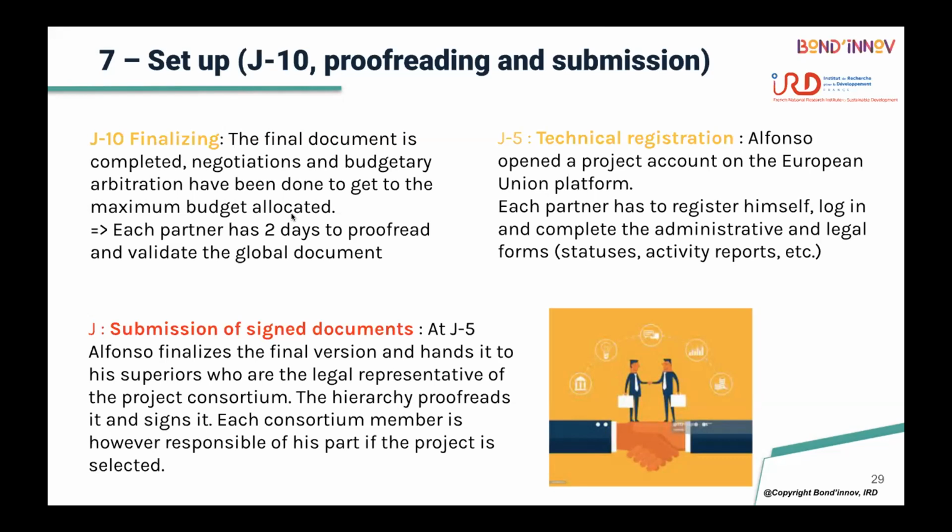So this is one of the reasons that you need to open your account on the platform and start putting in some data, even if it is fictitious data. You put it in just to be familiar with the platform and avoid any surprise. So, the day of the deadline: the submission of signing documents.